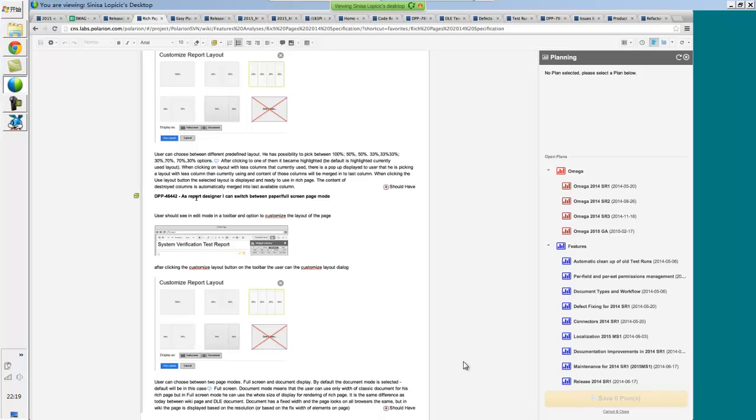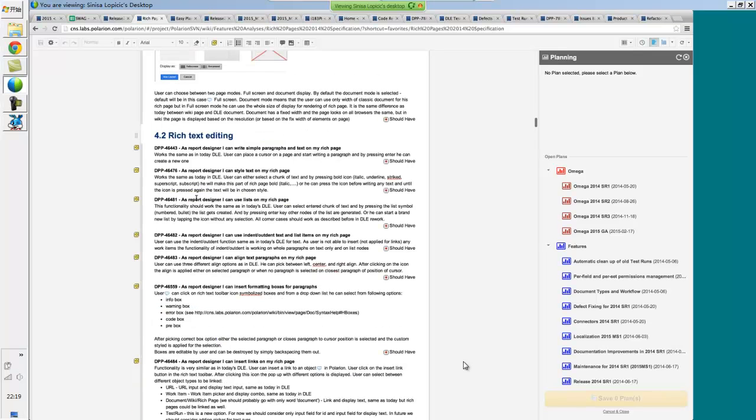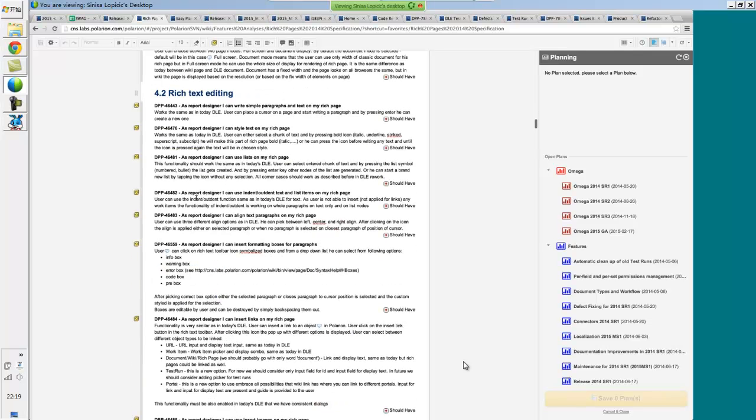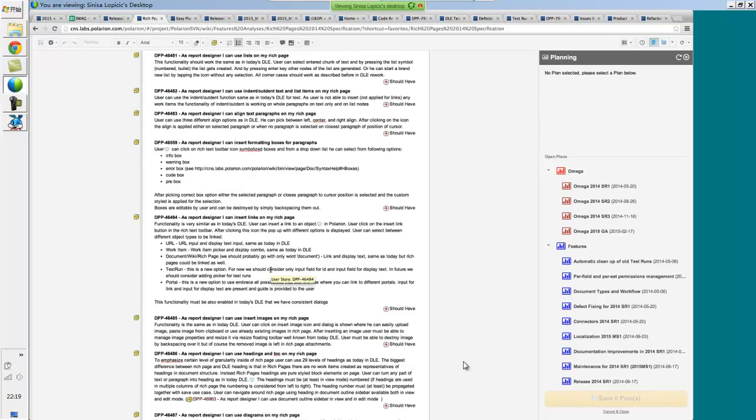Our preference is always smaller components, a project we can finish in one milestone or less. Rich Pages is unfortunately one of the very big projects that will take two milestones to complete, and therefore it's subdivided into a number of components. But even the smallest component is a user story that outlines the specific specifications around it.